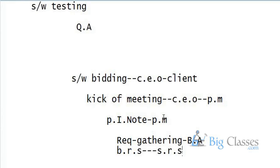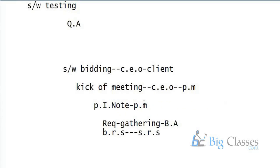Once the initiation note is baselined, the business analyst goes to the client site and gathers requirements. With those requirements, the business analyst creates two documents: BRS and SRS. BRS is the total requirements from the client — it's rough work. From the BRS, the SRS document is created to give developers and testers clear, detailed information about the requirements.